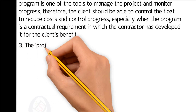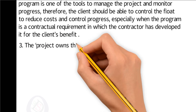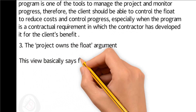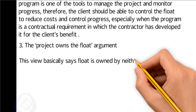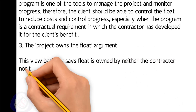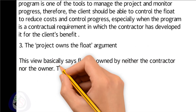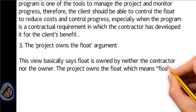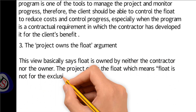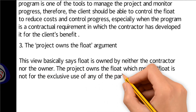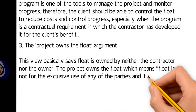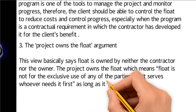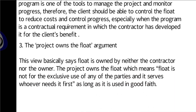Three — the project owns the float: this view states that float is owned by neither the contractor nor the owner. The project owns the float, which means float is not for the exclusive use of any party — it serves whoever needs it first, as long as it is used in good faith.